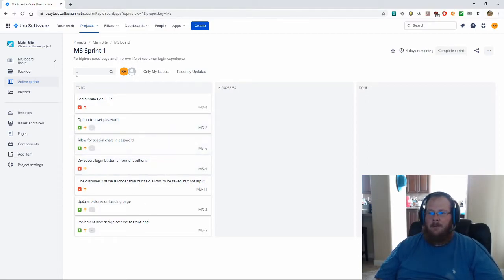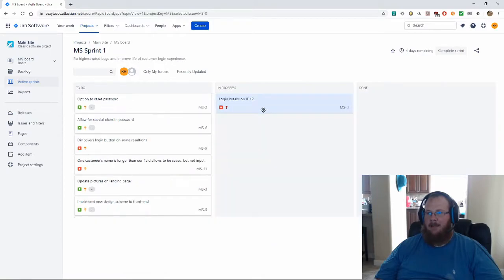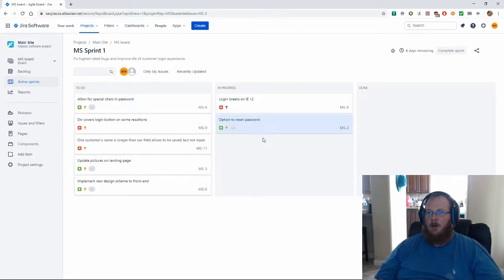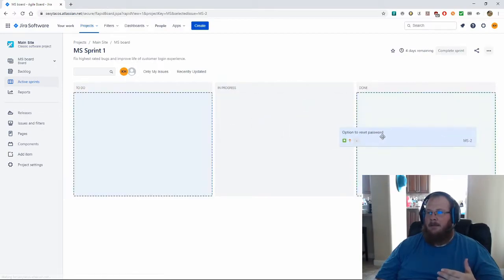and the ease of use is that as work is being picked up, say the first 2 devs pick up the first 2 tasks, they move them from one category to the next, to in progress. So now anyone who wants to know how the active sprint or iteration is going just has to come to this board and look at it, and they can see, oh, okay, they've picked up the first 2 tasks, they're working on them, there are still 5 things left to do. That's good to know. And say a couple days goes by and we get something like this going on, right?